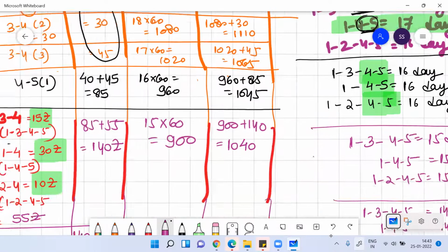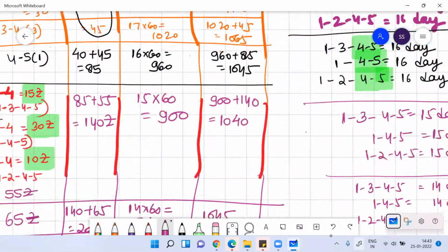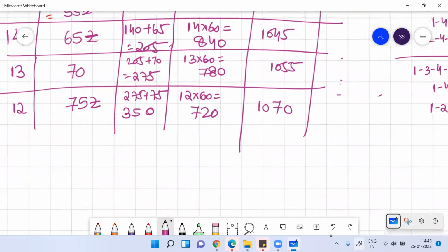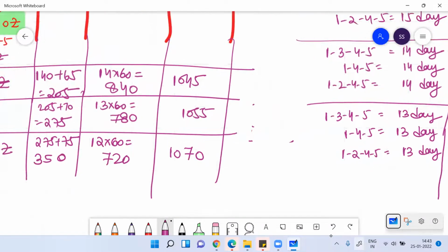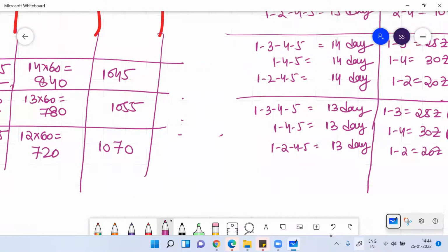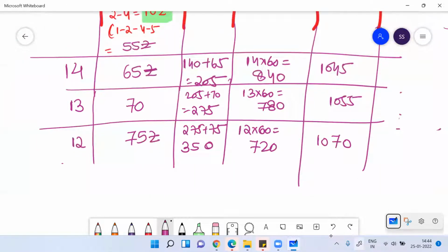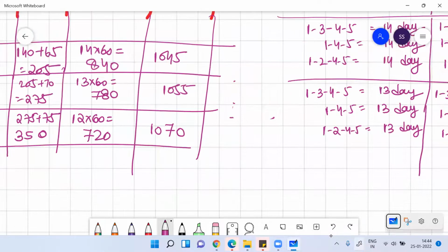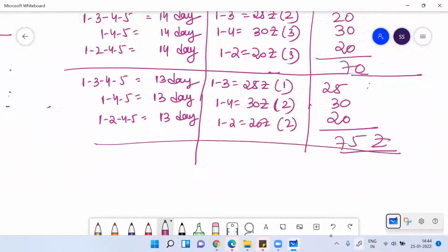You can see your total cost is now increasing only. You can see very frequently that it was supposed to reduce, right? But this keeps happening. So here, if you notice, for this critical path, which was 1 3 4 5, now you can notice nothing is left. 4 to 5 was already exhausted. The crashing for 4 to 5 was exhausted.